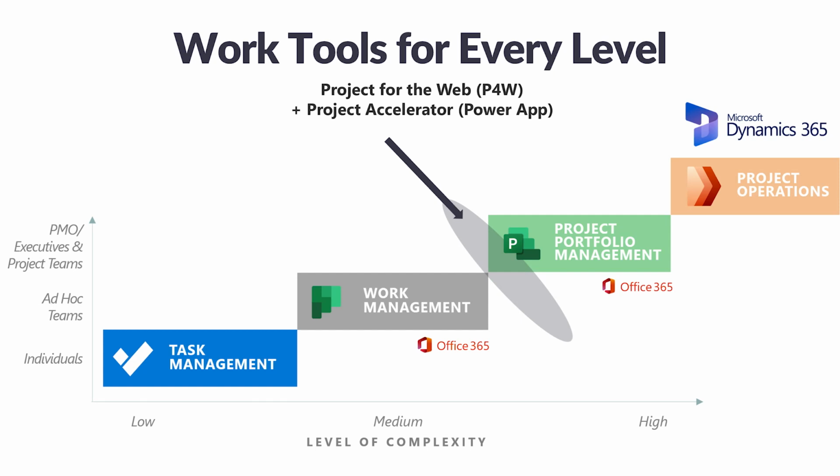We even think about Azure DevOps, saying, hey, listen, I've got this task work management tool whereby developers can come in, they can have their user stories, they get that same type of board experience, and they can even put estimates. But the idea is that it's not time phased, meaning that if something slips, I don't see a cascading chain that moves the milestones out three or four months, or pulls them back in if we crash the schedule by putting more resources on there.